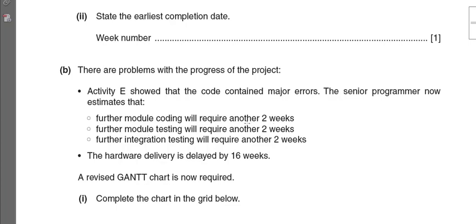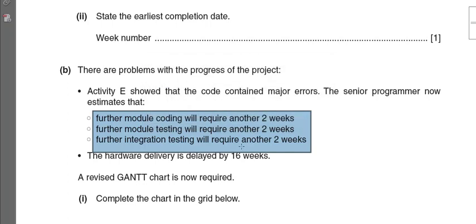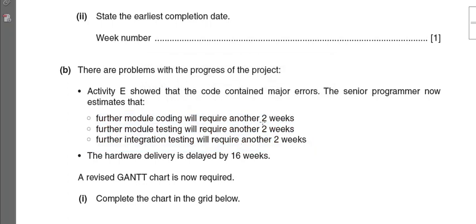also. So module testing can take place in parallel with coding, right? So once we are done with module testing, and once we are done with coding, then we can do integration testing. We'll package all the modules together, and then we'll test it once again. So these 3 things right here need to be done again. Okay. And he has also specified the timeline for these, how much each activity is going to take.